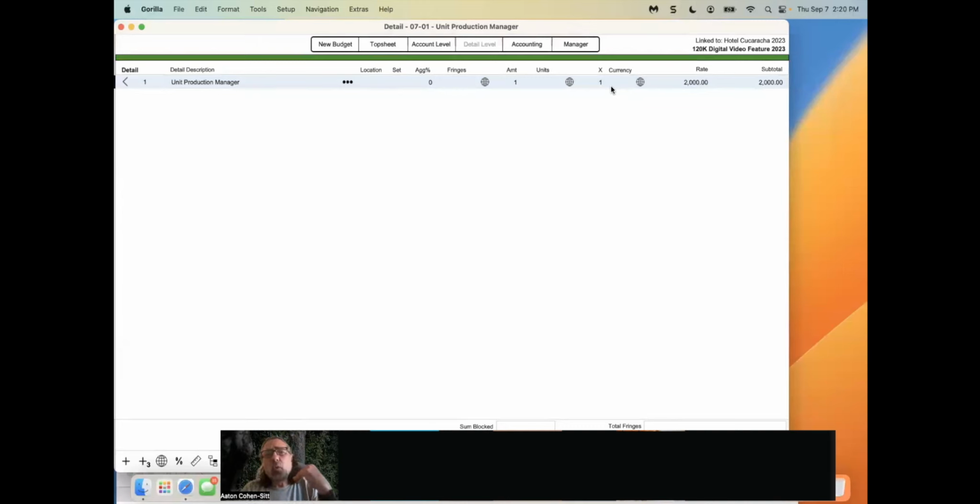Now, the way budgets work, I'm just going to go back to the PowerPoint real quick, is you enter an expense, which is amount times X times rate. Very simple. So you see amount, which is over here, times X times rate. So 1 times 1 times 2,000 is, of course, 2,000. If I were to change amount, for example, to 2, it would be 2 times 1 times 2,000, which is 4,000, right? So now, obviously, this is not a flat rate.